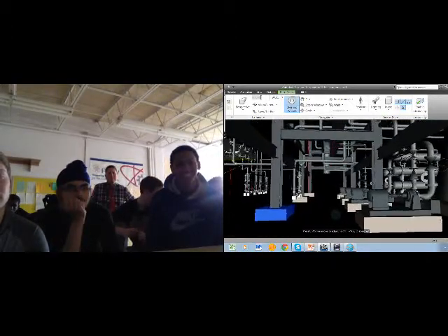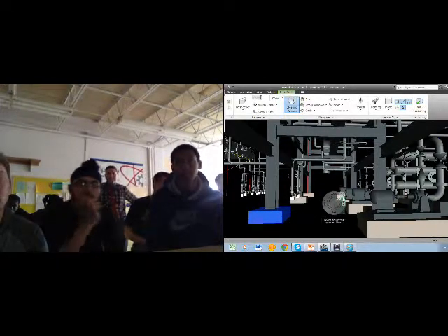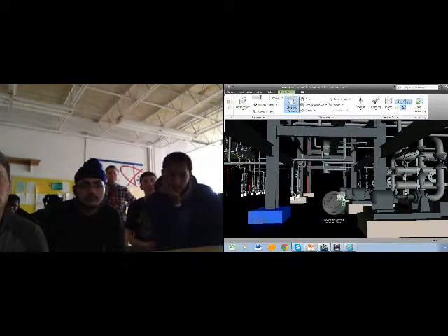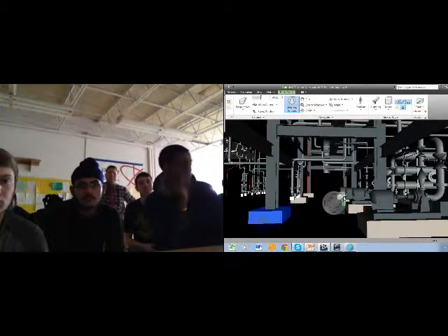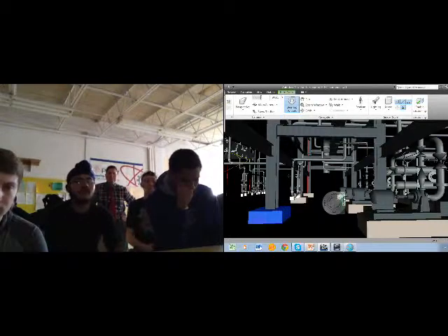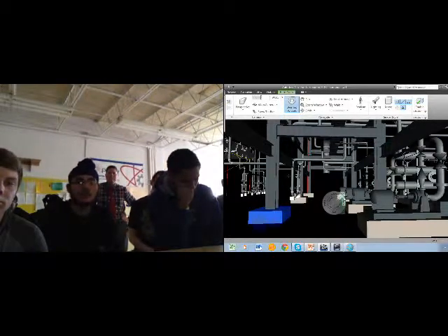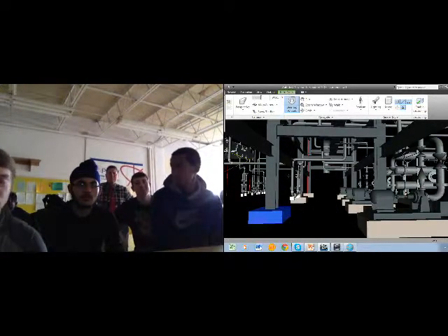So here you are. Let's stop for a minute and think of what we're looking at here. This is something that we designed in Navisworks, or actually we did this in PDS, and this is the process system. It hasn't been built yet. It's all electronic. There's not even any drawings cut from it yet. We're sitting the client down in a conference room and walking them through this model. If we were going to do this, after our fly-through, we would go line by line and ask the client if they approve of the routing of where these valves are located.